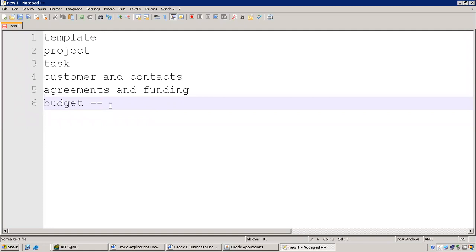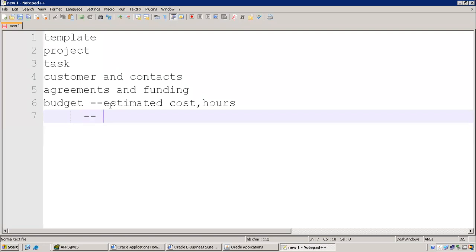Budget is an estimated cost. It is the estimated cost to finish any task or hours. Let's say for an IT services project, or the product development we talked about yesterday, for requirement gathering there are 4 resources required, 30 hours, and 10 days.